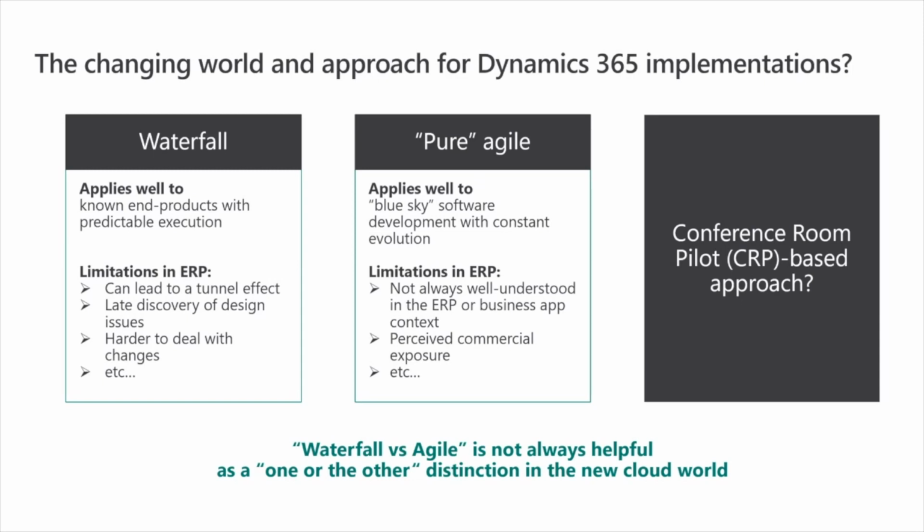Also, with the increasing SaaS world, the increasingly low-code world, the increasing use of tooling and applications that allow you to produce software without having to do a lot of heavy development work, a significant part of the work on a business application implementation is actually configuration, business process design, data migration, security, integrations. A smaller and smaller proportion of delivery is pure software development. It's important that we take that into account when we look at what is the right methodology, what is the right balance between the different approaches.